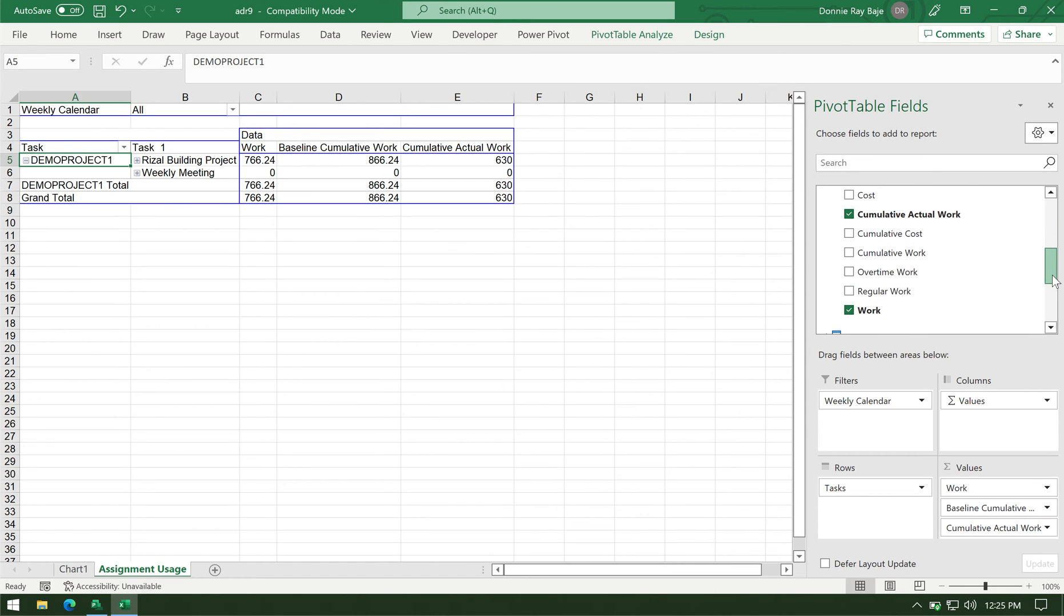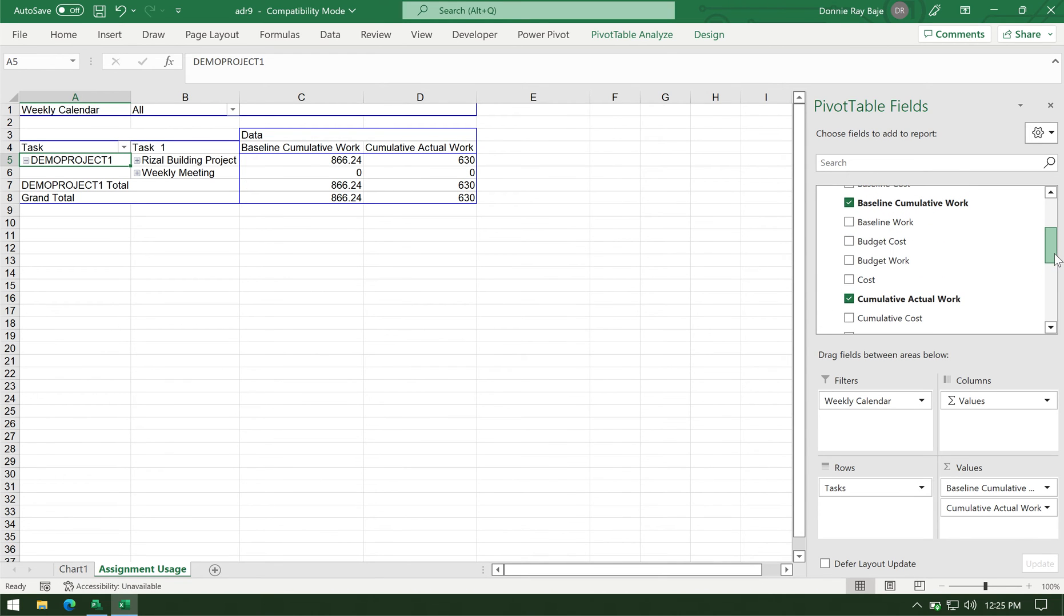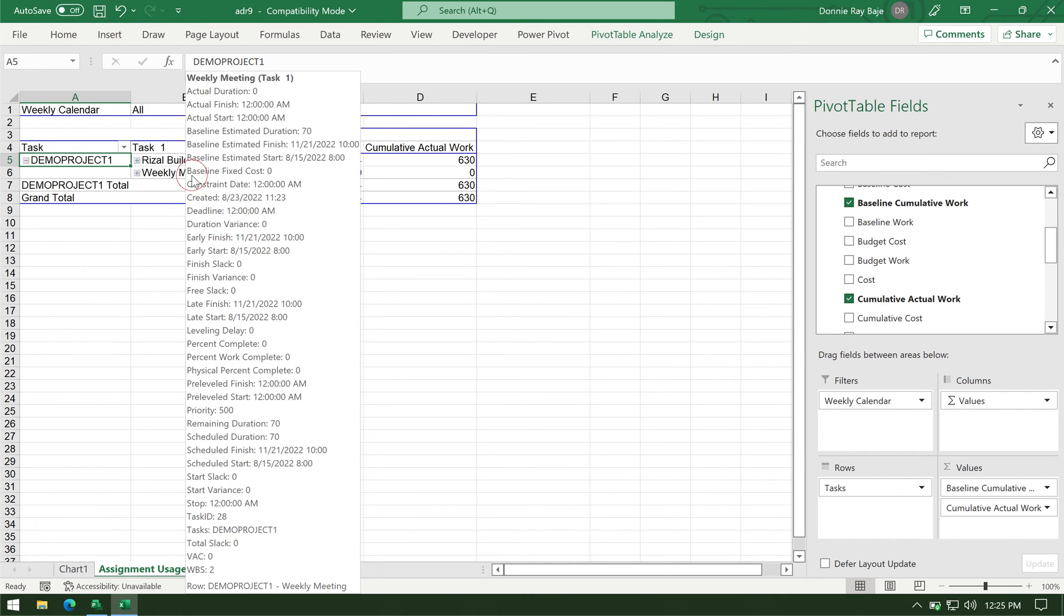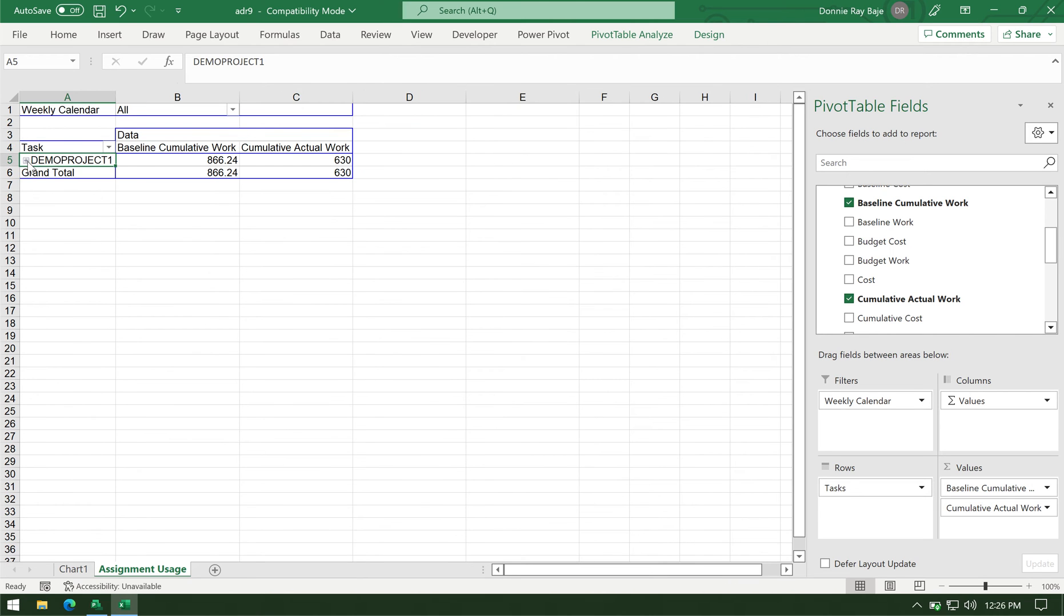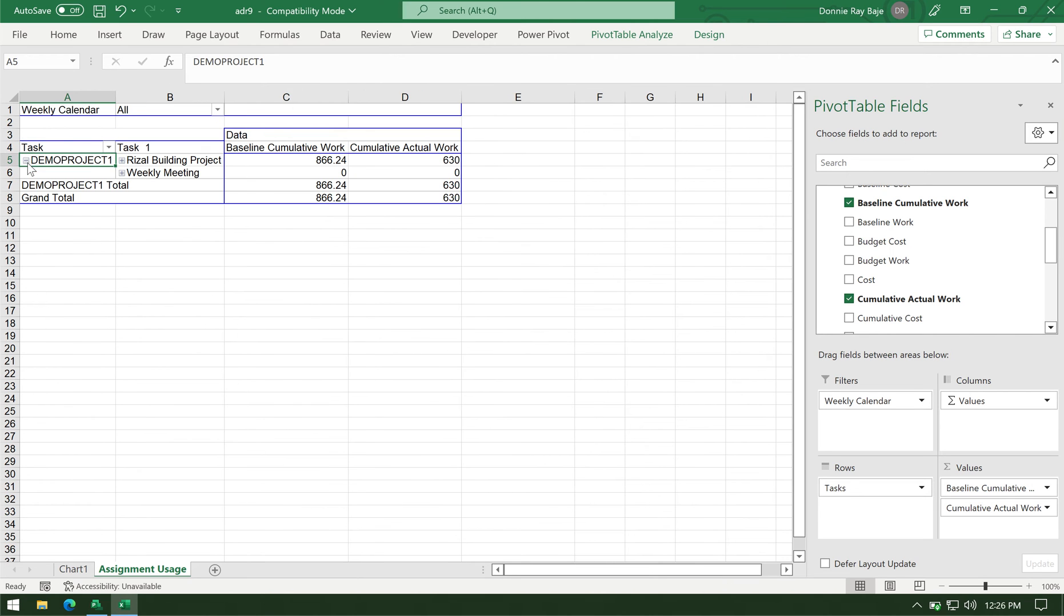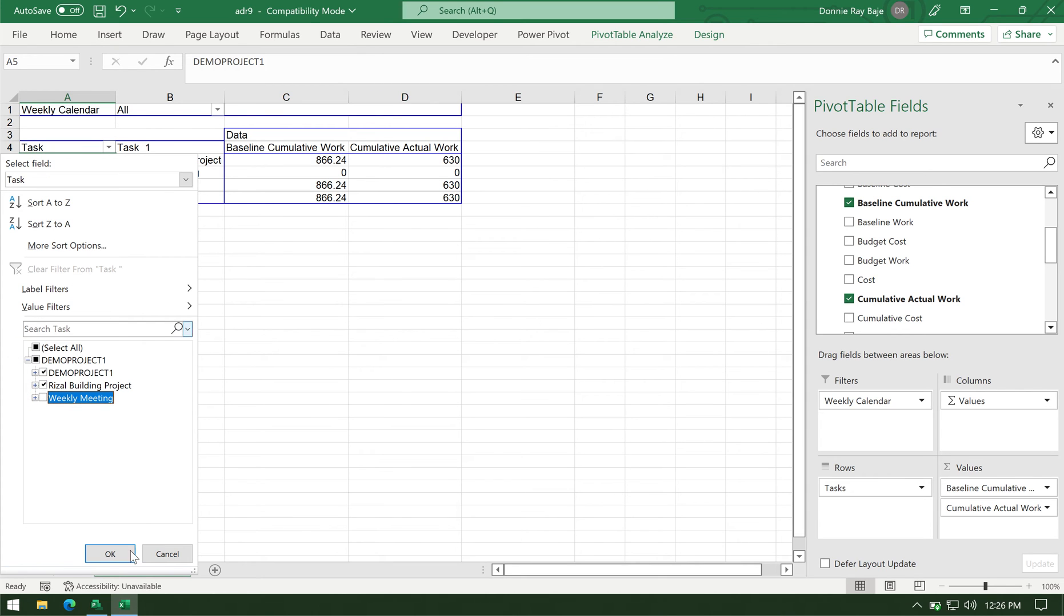We don't need baseline work. And the cumulative actual work. And check for anything that is not cumulative. So this one as well, work. So I have the two cumulative columns added in my report. The next problem that you may always want to check is if you have anything recurring in your report, like a weekly meeting in my case. So I have to remove this one because I don't want them to be plotted in my S-curve. So I have to drop down, filter the task from here. And then I have to toggle this downwards in order to remove the weekly meeting. They will sort of disrupt my S-curve. So click OK.